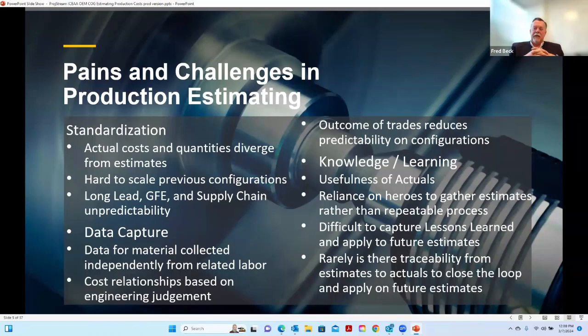And so storage in different locations and different systems and access issues, and sometimes just making sense of it can be a challenge. And then you've got the old trade studies that take place. Those from an engineering perspective are great, but they're just another change agent on your assumptions that you took into your estimation up front. You might have planned for the highest cost or taken a conservative approach on the outcome of that trade study, but the trade study ends up going sideways and comes up with a completely different design change that forces again yet another perturbation to what you've estimated.